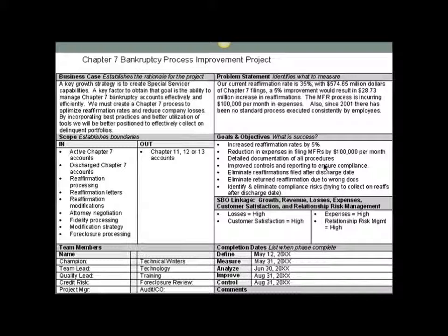For example, if your goal is ensure that the pizza arrives to the customer warm, change that to say, ensure that the pizza is delivered within the 30 minutes time frame. See how you could basically track that and monitor that and make sure that your delivery guys are compliant with that. That's your specification limits that you set for your delivery guys.